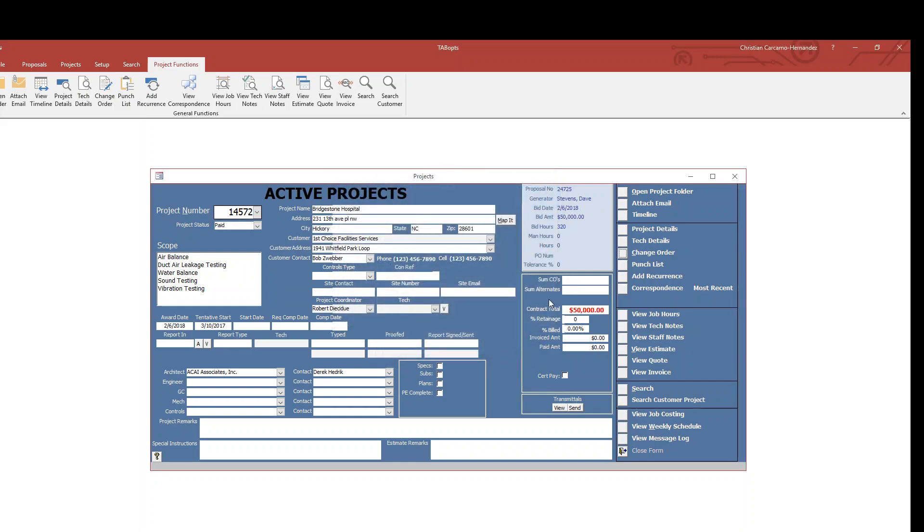Within the TabOps screen, you'll notice the contract total turns red. What that does is it lets you know that you have pending change orders that haven't been approved.